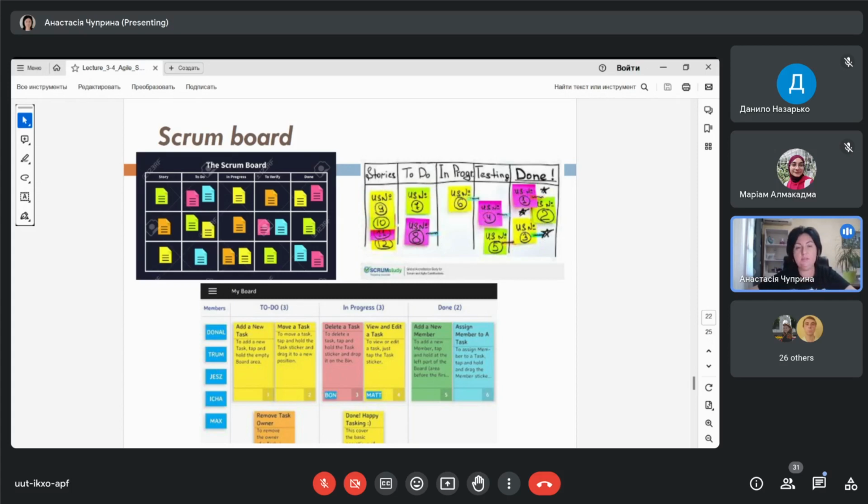In this situation, we cannot add extra days or extra hours to the sprint. We cannot add additional time into the sprint. It means that tasks which you didn't finish in time will have the most priority in the beginning of the next sprint. So you will copy these sticks and put them into the next sprint as tasks with the highest priority.